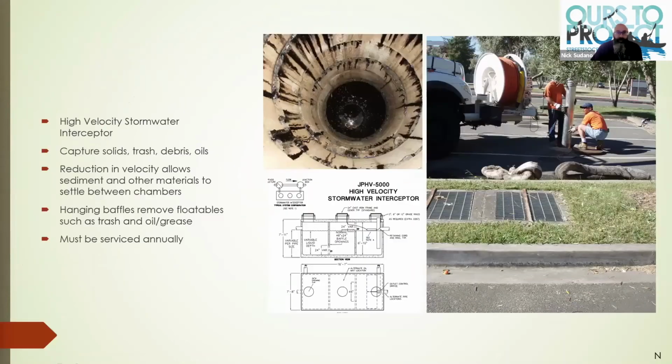So again, just really wanted to point these out to show you that you might have these features on your site, and if you're a design engineer, to call these out so that the contractors and the owners know they've got them there. The other thing is, lessons learned over a period of time is that sometimes these are installed without the right access points, and it makes it very difficult to maintain and clean. So just making sure that those are part of the project plan and design.